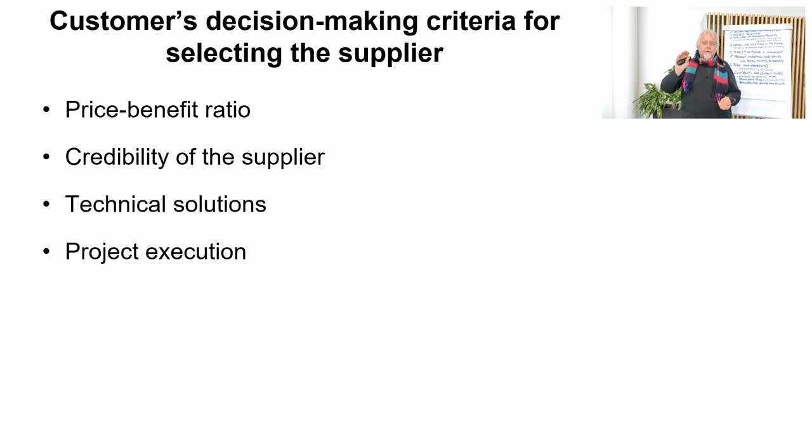So the option, in the option you can of course make a completely other bid, where you say to the customer that of course we respect what you want from us and we bid it, but then we have here an option that you can also choose an alternative, and we think that this is a much better solution for your problem, at least we would appreciate if you would consider it. And that is the way to keep yourself in the competition.